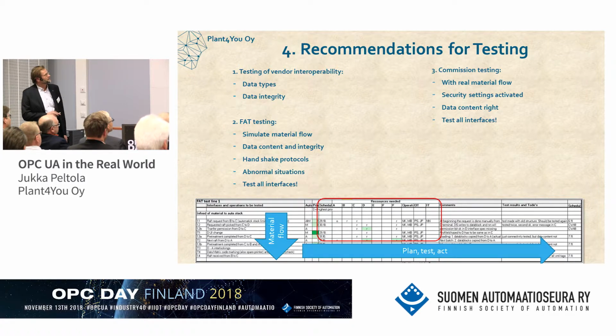When this is done, you can go into commissioning and then you should do the same with real material flow. This is the most important thing, I think, for implementations.